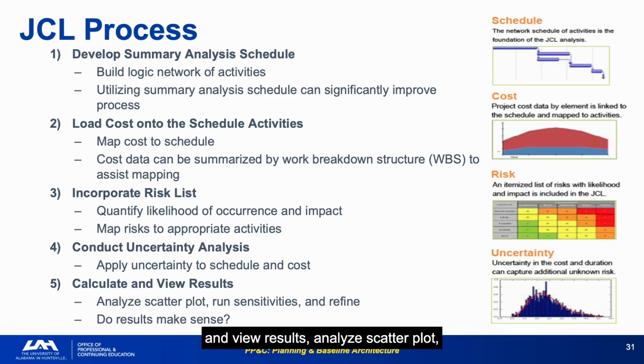Calculate and view results. Analyze scatterplot, run sensitivities, and refine. The refine step is where most of the analytical value is extracted. Sensitivity analysis tells you which inputs drive the most outcome variability, which is where you focus management attention.